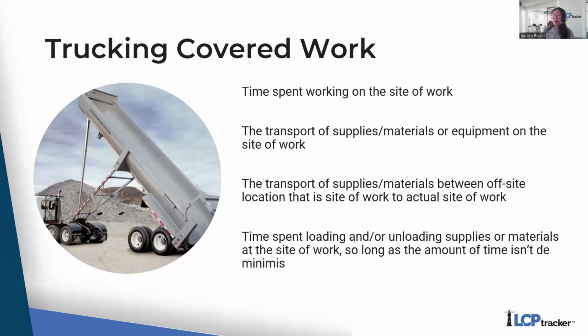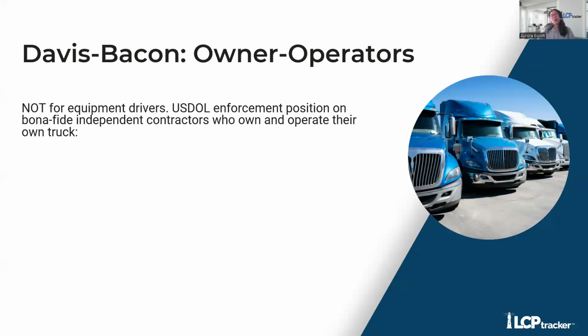Spending about an hour to 2 hours Monday, Tuesday, Wednesday, Thursday, Friday, that would be 2, 4, 6, 8, about potentially 10 hours of loading and unloading time out of a 40-hour work week. All of a sudden, things don't look de minimis anymore. So really, you're going to want to use your best judgment when looking at your trucker's time loading and unloading supplies.